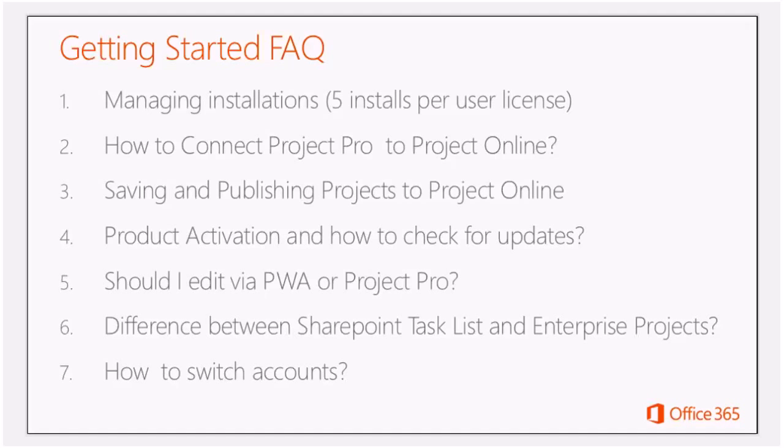But if you're working on a project, it may not just be a case of checking them off. You really want to go in and say, okay, well, this task is 50% complete, and you may even want to change the end date or the estimate to complete or something like that. So the enterprise project interaction gives you a lot more capabilities than a SharePoint task list would in terms of giving that feedback to the project manager on how you're progressing with that task, whereas the SharePoint task list is, yep, done it, carry on, move on. Yeah, maybe a more simplified version of it.